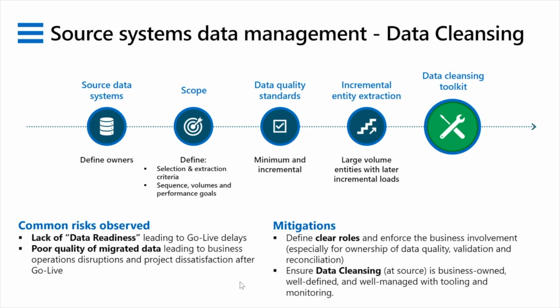It's not coming over into the new system. If it does not meet these criteria, it's not going to come over until it meets the following criteria. You may have incremental data quality requirements where you say, well, it's met the minimum bar for the first cycle of data migration, but before we take it in the next cycle, it needs to have the following attributes well defined. So you may have incremental data quality requirements, and that's fine, as long as they are well defined and the responsibility for making sure that those criteria are met are with the right people.